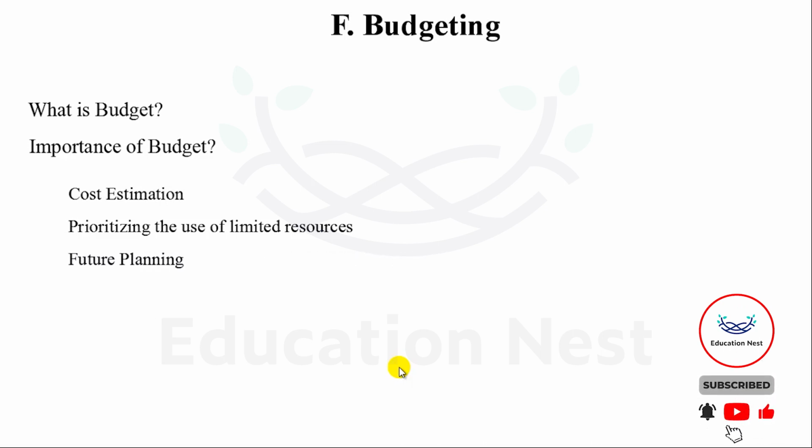Next is future planning. Now, don't get confused with this term yet, okay? I know future planning was a part of forecasting. How is it ending up in budget will be a question in your mind. Once you have an existing project going on, it's important for you to always keep track of what's the expected cost going to come up, what's the expected budget going forward to complete the project, okay? Many times it happens that if a project is of 6 months and you had estimated a total cost of $100,000, by the time you reach only 1 month, you have already spent $50,000. There can be tons of reasons for that, but for the remaining 5 months, you do need a good amount, and here future planning helps you.